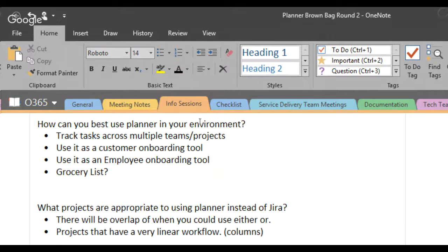I would add that in Planner, there's very little actual breakup of responsibility or authority. There's no hierarchy really, so anyone can delete a task that anyone else created. If you're looking for change tracking and things like that, I would not use Planner. But if you have someone dedicated on your team as the task manager, who's the only person who puts tasks in, and if something's deleted it's because that person deleted it, sure.